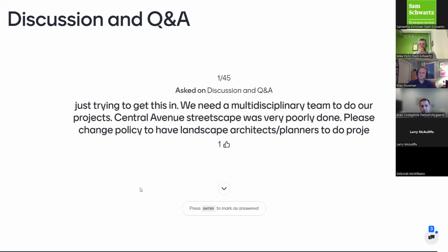I see in the chat, Adam asked how we're factoring in cost. So, yeah, it's true. We didn't include it in what we presented today, but we did consider relative costs both for capital implementation for building it and for operating and maintaining it. So that was definitely one of the factors we considered when thinking about feasibility. And so the things that we're recommending that the city prioritize are things that either don't cost much or have a high benefit to cost ratio. We didn't develop detailed cost estimates, but it was based on the relative cost. Just wanted to answer that one.